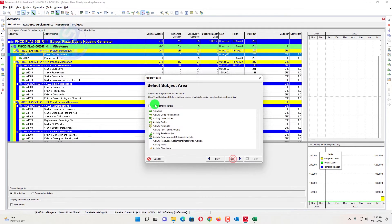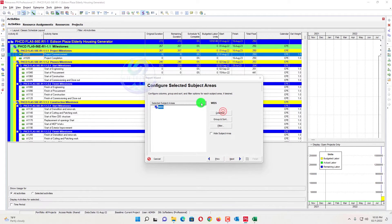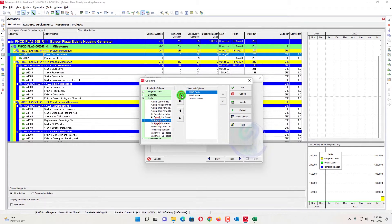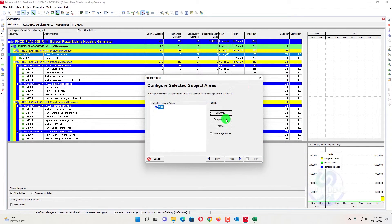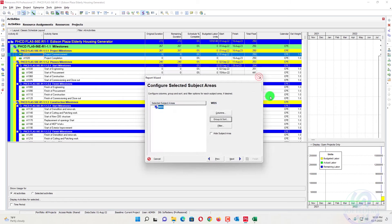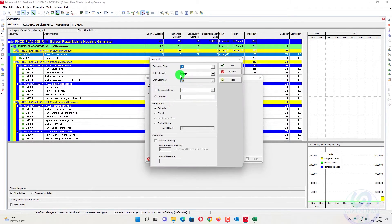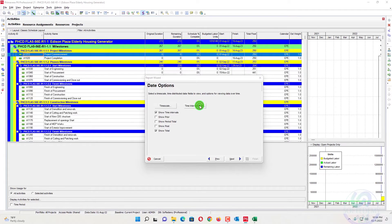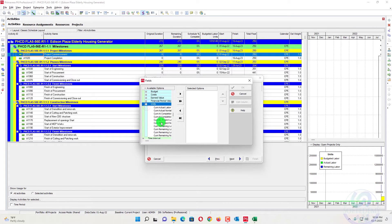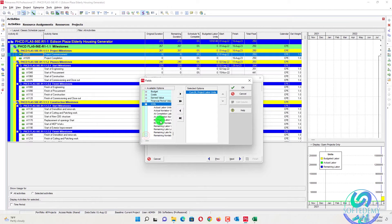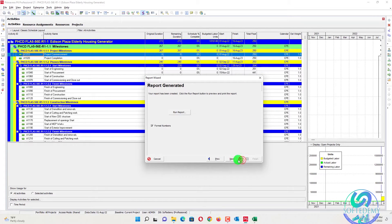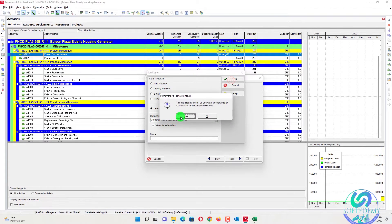I will go here in the tools in report wizard. I will go here in new report. Time distributed data. Go for WBS. Columns. Here we will add a column. If we need a column here or not, it's your choice. But we will add a column here. Budgeted labor, baseline, project labor units. Okay. Group and sort by. I will just remove to level one. Apply. Okay. Then we will go for next. And we will go only the total here. Time scale we need in the month. And also time interval fields. I need two columns. One column I need is baseline cumulative labor units. The other column I need is baseline project labor units. One cumulative, one without cumulative. Then go for next. Next. We will run report. We need that report in Excel. So I will press okay. Yes.